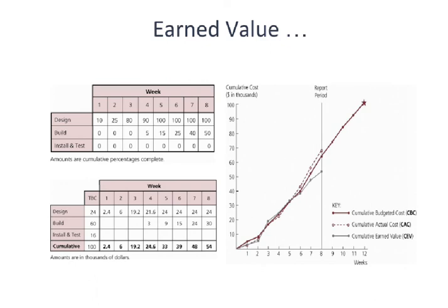Now, up at the top, you will see how things are progressing. So this one here: 10% during week 1, 25% during week 2, 80% complete by week 3, 90% by week 4, and then this was only a 4-week duration project, the design. So as of week 5 on, it should be at 100%.